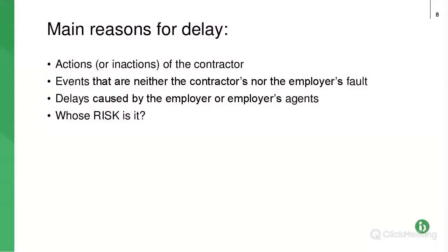So this is the section I just want to deal with very quickly. I don't want to focus too much on this, but it's just a reminder not to forget these points. So if you're claiming extra time, so an extension of time, that you're entitled to extra time, you need to show that under the contract a risk event has occurred that is not your risk and that it is your client's risk.